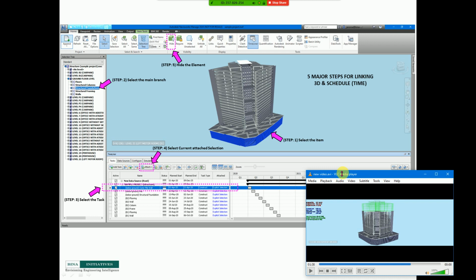In the future, because our modeling team just looks at objects, one column could span three floor stories, so we just model it as one. Correct, the construction sequence. Yes, construction sequence is the right term, sir.